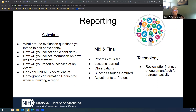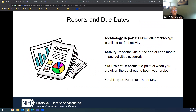The mid report is due at the middle of the project year. The final report is due at the end of May — your project ends by April 30th, but you have until the end of May to submit the final report. The technology reports are due after the first use of the technology in an outreach activity, and activity reports are due at the end of the month the activity is conducted.